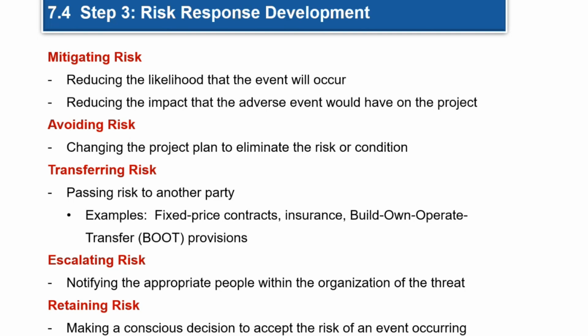There is also avoiding risk. If a project can avoid the risk, basically eliminate the possibility of the risk. Sometimes transferring risk can happen in some projects. For example, if they transfer risk, they give the risk maybe to the suppliers or other stakeholders. But normally that comes at a cost. If you want to transfer the risk to someone else, normally they have to pay some financial costs.